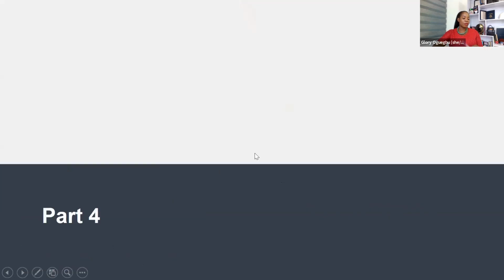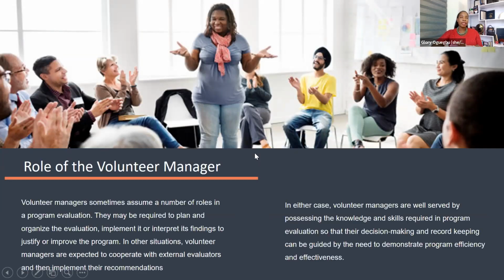And you also have the activities you outlined for the program and the deliverable from that particular activity. So if, for example, you said in your activity that you were going to reach out to the king of the community and ask him to donate a space for you to hold your program, what is the deliverable? The donated and cleared space.